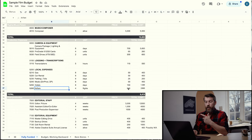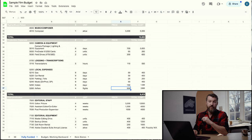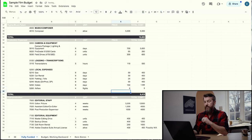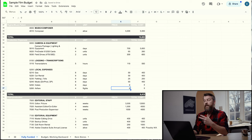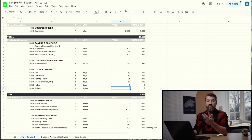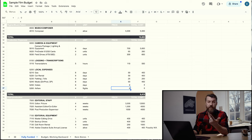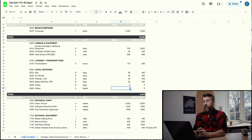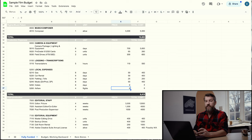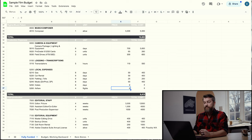Since this is a local shoot in Knoxville, we can take airfare down to zero and hotels down to zero. You can see why hiring local is sometimes beneficial — you don't have to pay for things like hotels and airfare, which is often almost as expensive as just hiring the person on a day rate.